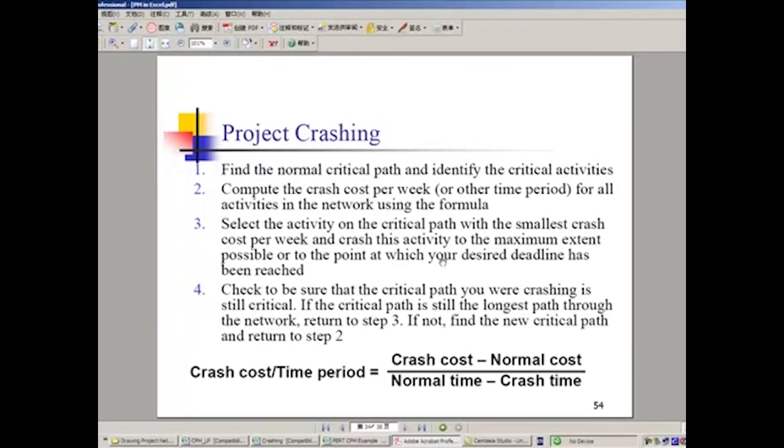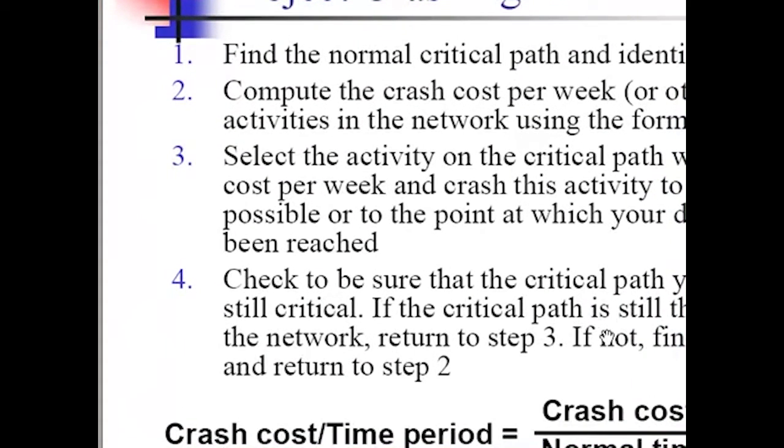So to meet the deadline, for one specific activity, normally we can expedite it. We can shorten its duration by inputting more resources, like hiring more people to work on that activity, or using advanced technologies, new machinery, or new materials, which of course will cost us much more. So in that case, we introduce new terminologies.